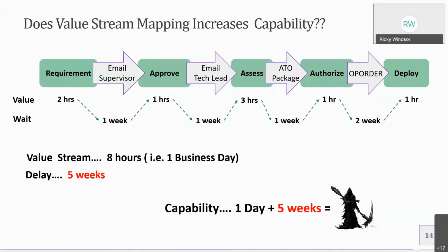If we have that cross-functional team or that cross-enterprise team of teams perspective, does that allow us to shorten those time periods, right? For instance, we'll say in this room, if you had someone who collected requirements, approved requirements, and assessed the requirements all in the same room where they could discuss exactly what it is and build an incremental level, how quickly could you crash that schedule, right?